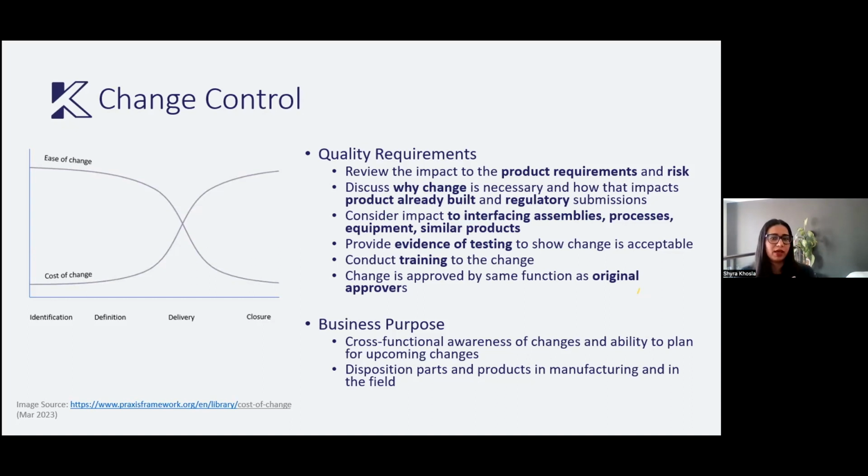But as you get into testing, and especially once you've finished your testing and your validation, making a change becomes a lot more intensive, and it costs a lot more to make it. I'll talk about why as we go through the quality requirements, but this actually applies to every project. The graph I've taken on the left is just a general project management graph. It's not even medtech specific.